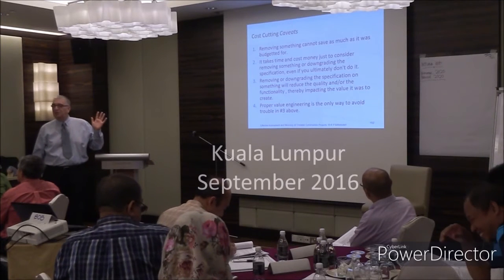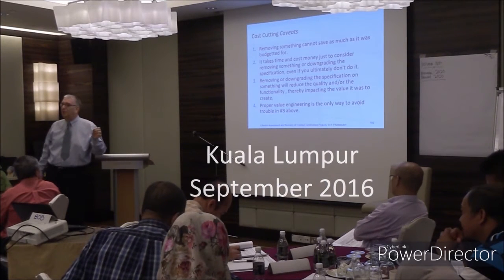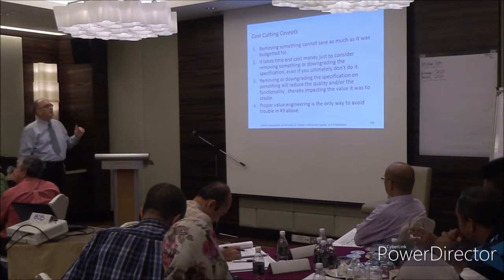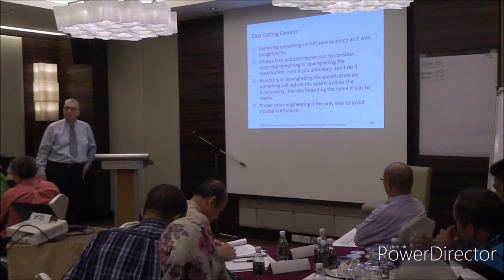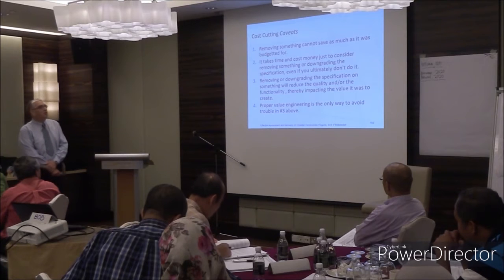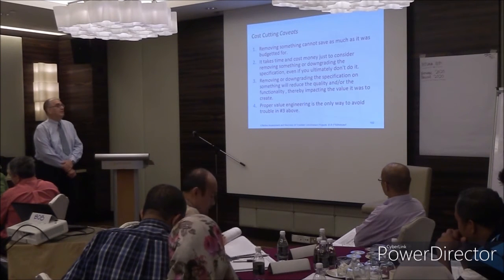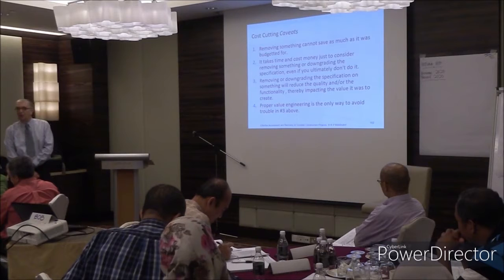Back to the point of cost cutting, because this is always something you need to look at when you get to a troubled project. Remember that removing something doesn't save as much as it was budgeted for. It takes time and money just to consider removing something. Somebody's got to spend the time looking at it and making a decision, or downgrading it. Even if you don't do it, it's cost you money.